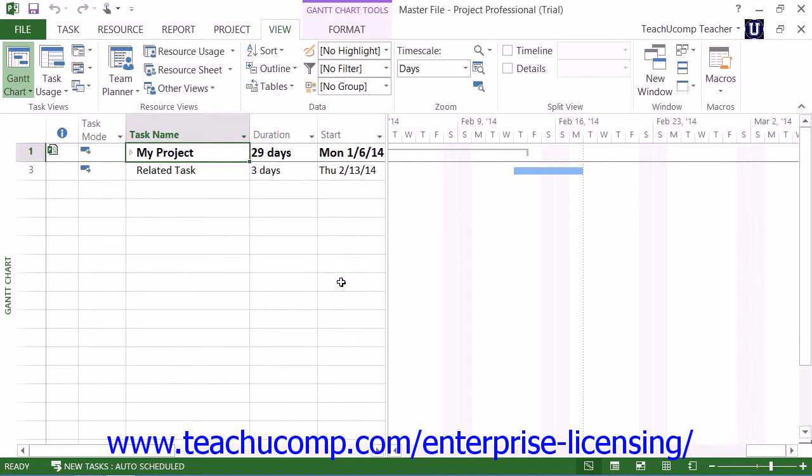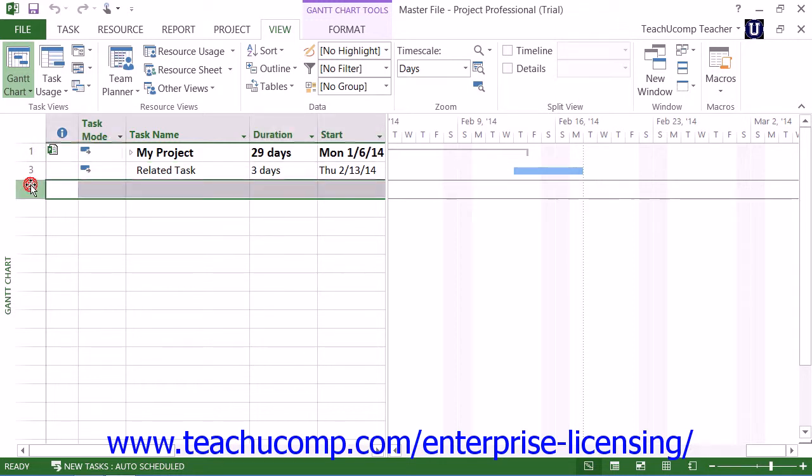To insert a subproject into a master project file, first select the row within the master project file where you want the subproject data to be displayed.